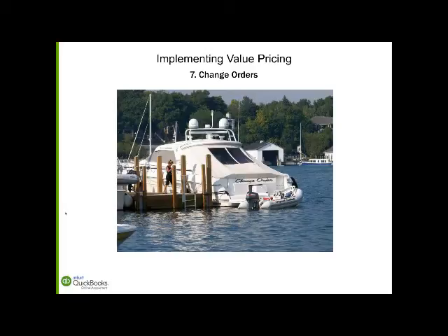Sometimes, and Ed talks about this in his article, what we really start with is not the change order. We start with a change request. Somebody sees that something's out of scope. Sometimes, and I would say most of the time in our world as accountants, you see the change order first. You see something out of scope first. But sometimes it's very possible the customer could see it. Whoever sees it is actually requesting a change. So just like you have a purchase request before you have a purchase order, you have a change request. And you document, hey, this is outside of the scope. This needs to be added on into our engagement.